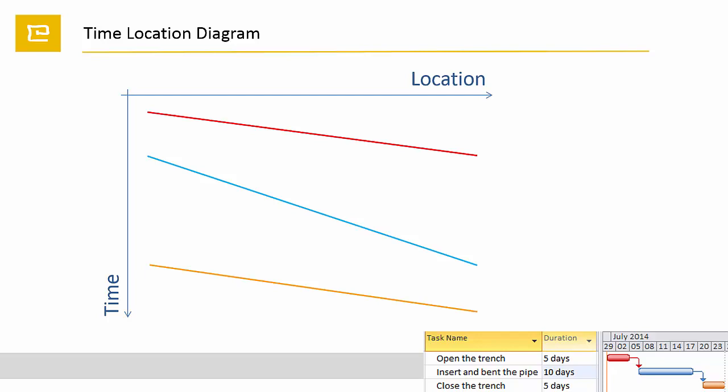In the time-location diagram you may see that the blue and orange activities, pipe-laying and closing the trench, could be moved up without crossing the other activities. This means they could start earlier.